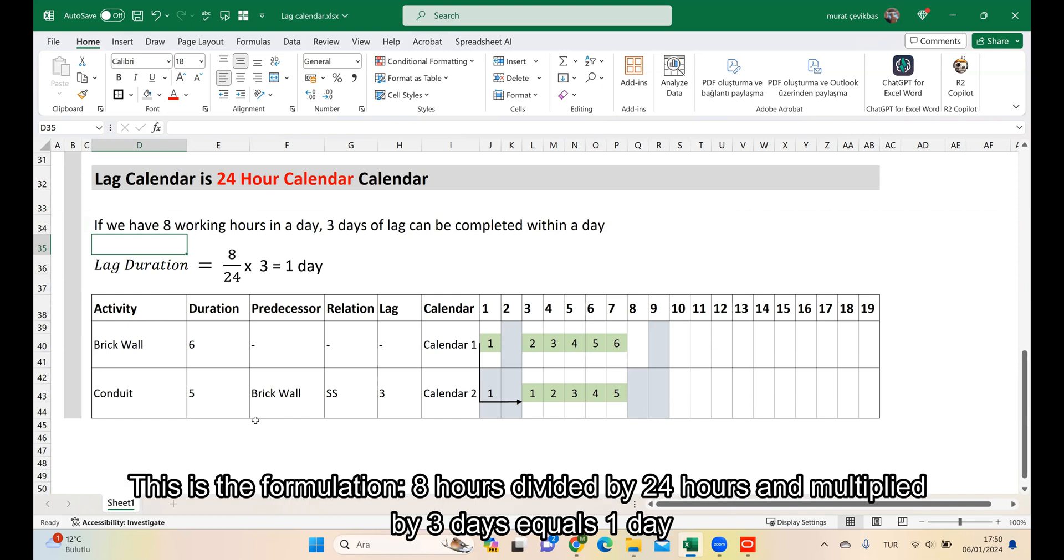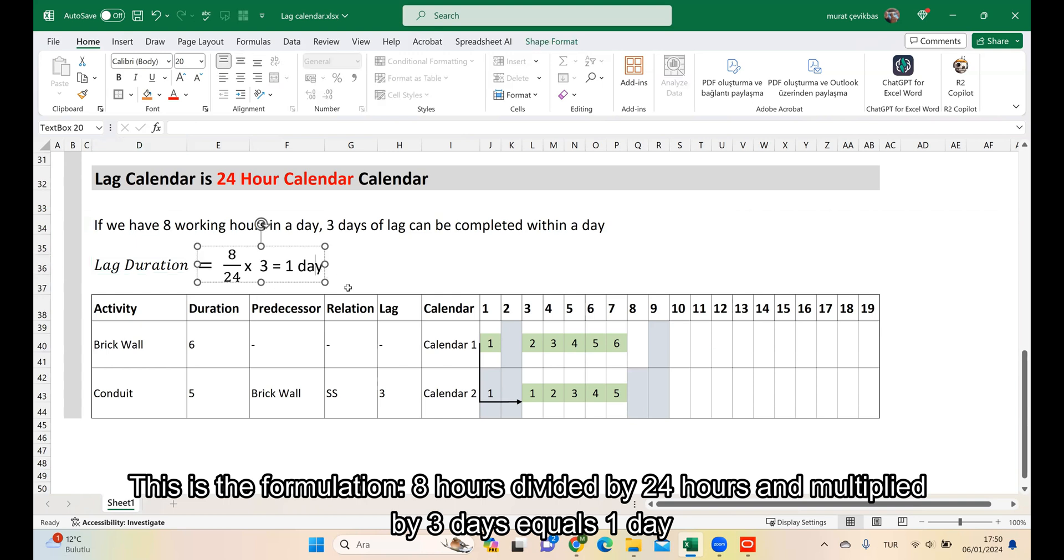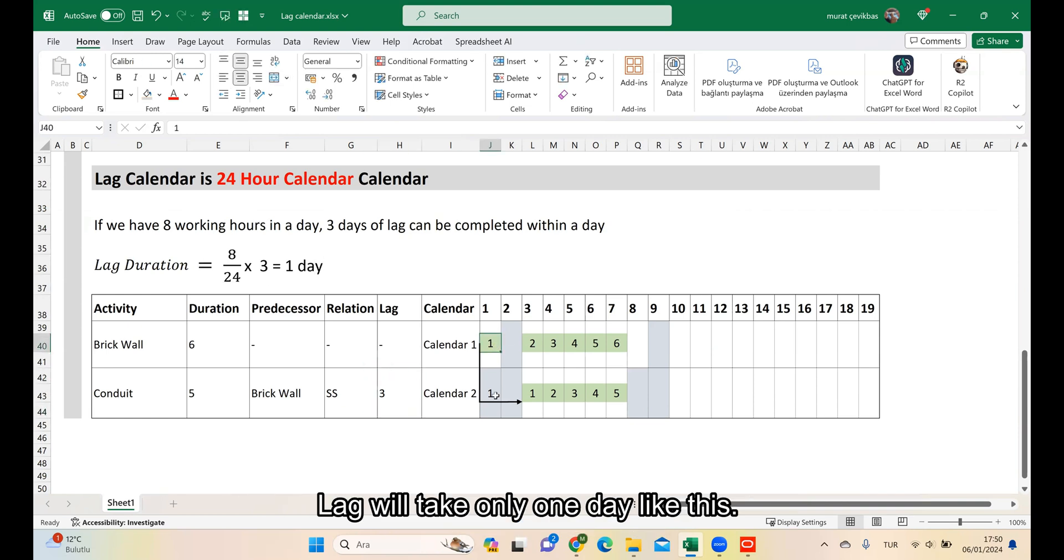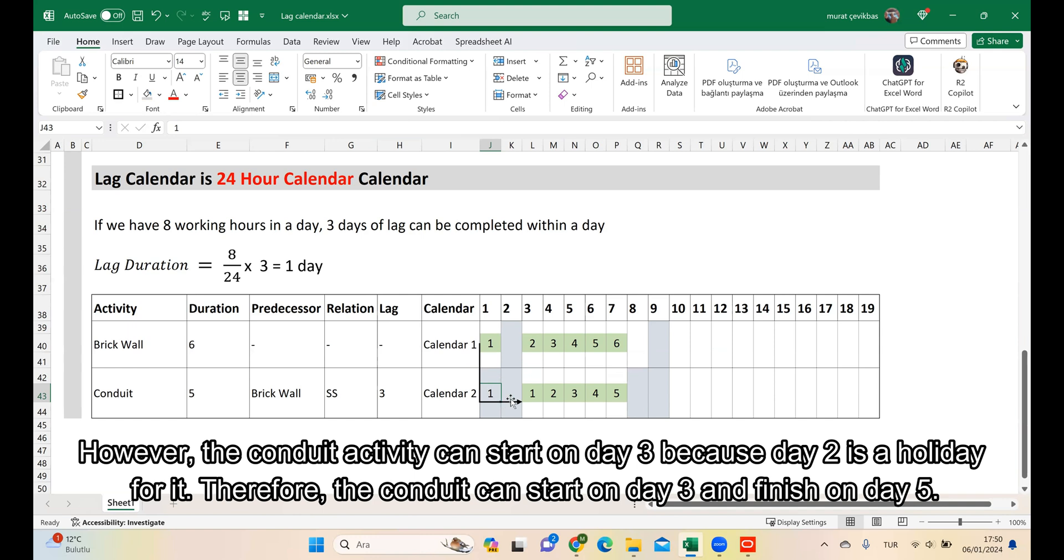This is the formulation: 8 hours divided by 24 hours and multiplied by 3 days equals 1 day. The lag will take only 1 day like this. However, the Conduit activity can start on day 3 and finish on day 5.